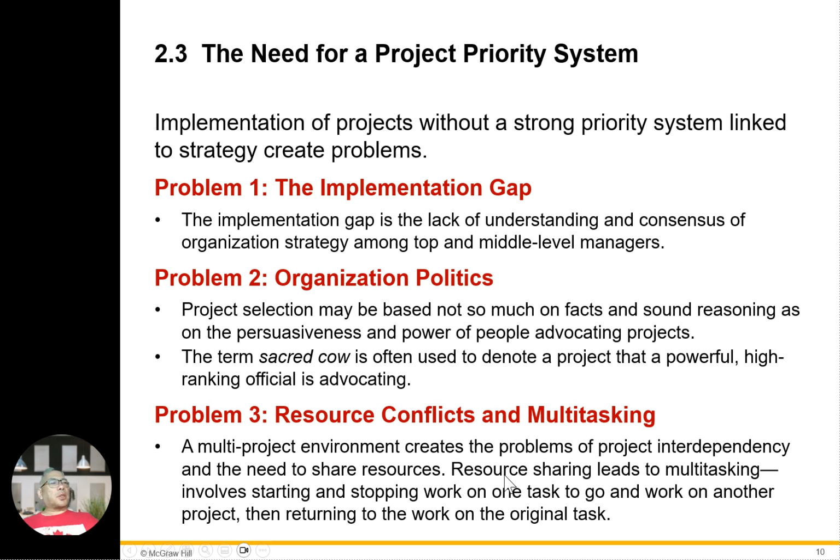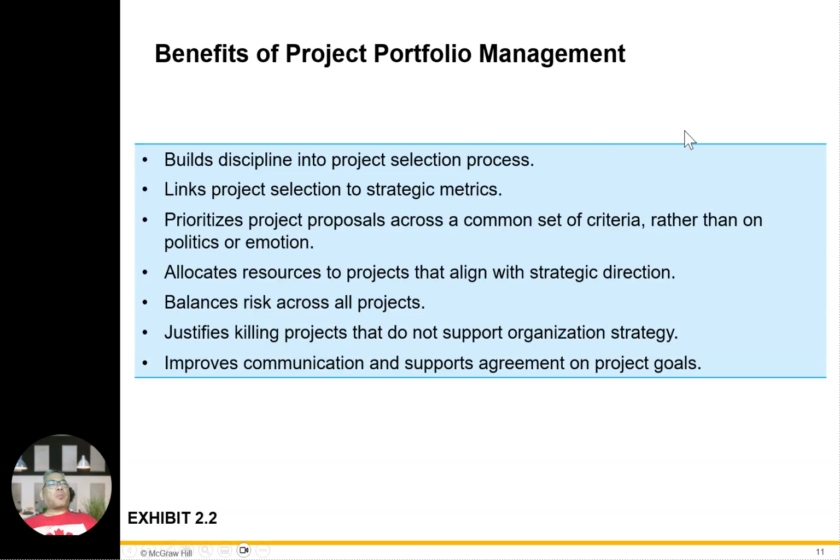Problem 3, resource conflict and multitasking. A multi-project environment creates a problem of project interdependency and the need to share resources. The resource sharing leads to multitasking. It involves stopping work on one task and going to work on another project, then returning to work on the original task.